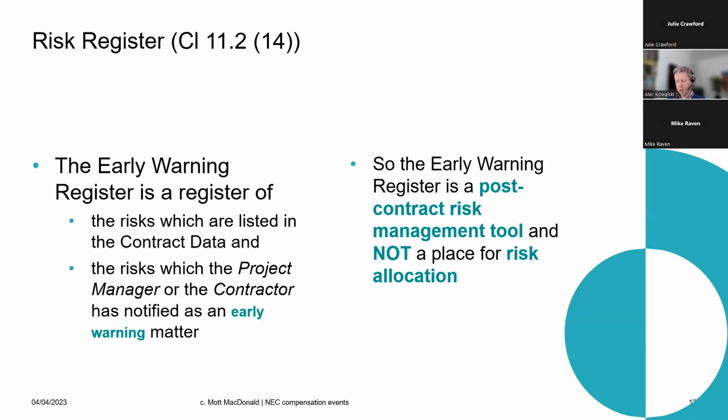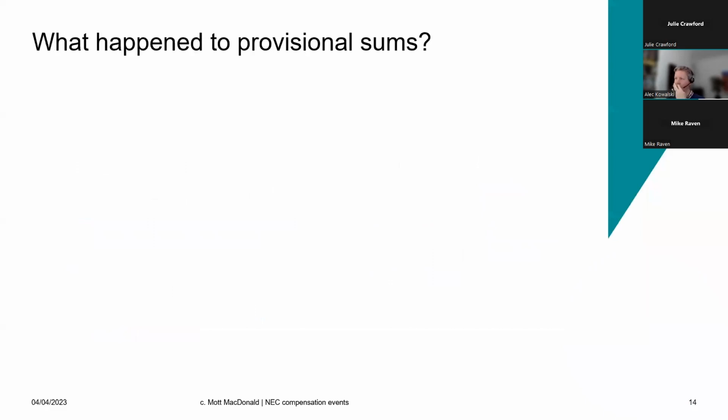And then that also means be really careful with your tender clarifications procedure as well. So throughout the tender process, there have been some questions, and those questions have been answered. Those answers have to make their way into the contract documents as well. It's all about that allocation of risk. Why is it so important? Because we have to understand whether when that risk happens, is it going to trigger a compensation event, or is it just for the contractor to deal with? This is why this is so important.